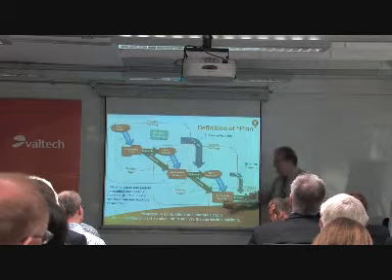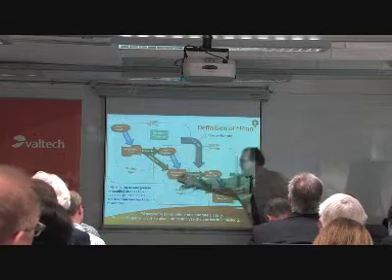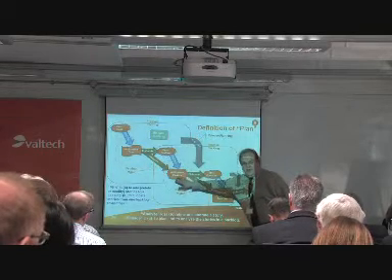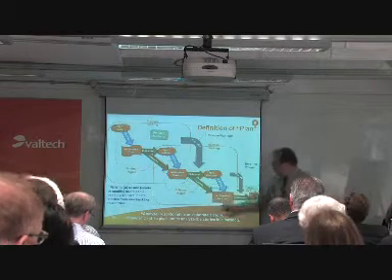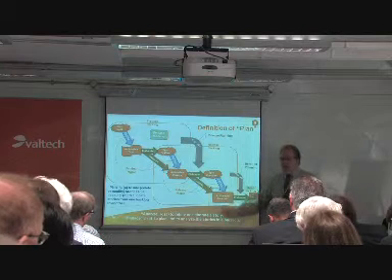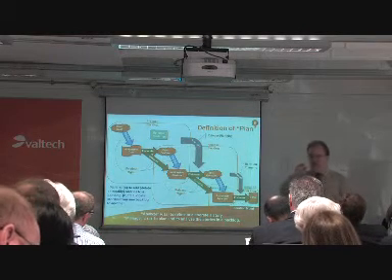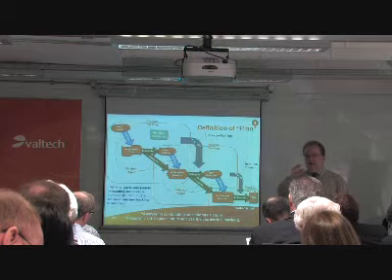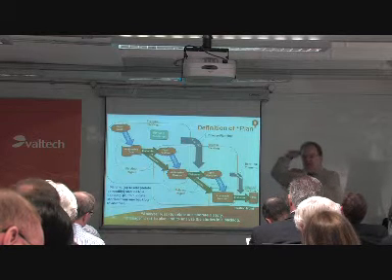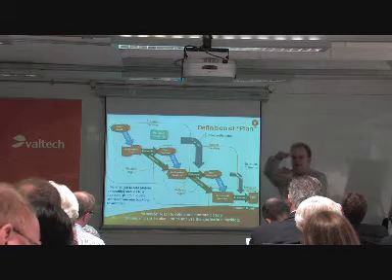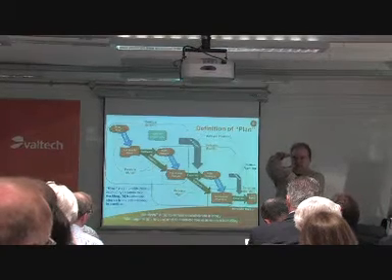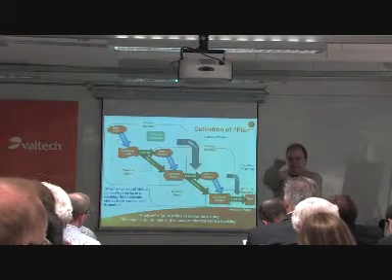I have techniques at this level of functions that, moving from this level, which is no fidelity estimates plus or minus 200%, down to this level, I can get down to low fidelity estimates, which have a precise definition. They're plus or minus 50% in variance. And so I can give you a 90% confidence interval, and it'll be much narrower, but it won't be one point.